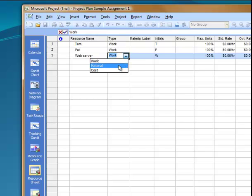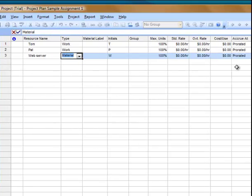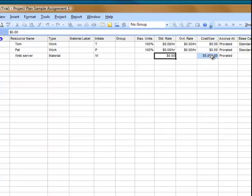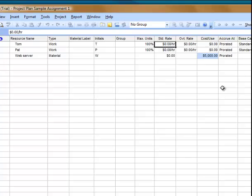but I know that the web server is going to be a material. And I want to enter a cost for the web server, $5,000. We're going to enter some rates for the team members. Let's say that Tom is $40 an hour, and Pat is $60 an hour.